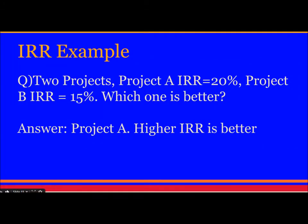IRR Example: Project A has an IRR of 20% and Project B has an IRR of 15%. Which is better? In the case of IRR, the higher the IRR the better the project. So remember: higher IRR is better.